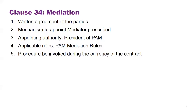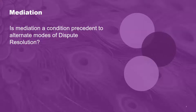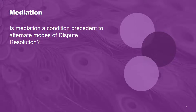Quickly moving through the various dispute resolution methods: the first is Clause 34 mediation. This is not a new clause — it was also in PAM 2006 in Clause 35 and is substantially similar. Key points to note: you must have a written agreement to mediate; the appointing authority would be the president of Pertubuhan Arkitek Malaysia; parties can mutually agree within a set time frame, and if they fail to agree, you go to the president of PAM. Mediation can be invoked during the currency of the contract. The answer to whether it is a condition precedent is found in Clause 34.1, which uses the word 'may' — giving you an option, not an obligation. PAM goes one step further and expressly states that mediation is not a condition precedent to adjudication or arbitration.